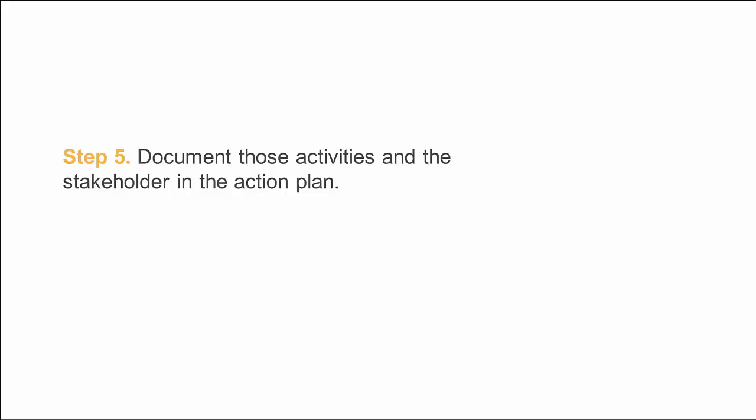And what you're going to find are a couple of things. One, if you're focusing on a knowledge aspect or a skill, there is almost 100% of the time an associated process. So you might have started with a lot of skill-type actions in your action plan. What you'll find is that once they're finished, they're going to create process-related actions that you need to take. In other words, the action plan will continually spin off new actions across the perspectives. So as you prioritize, you'll take your 2 to 4 weeks, complete it, then create your next version of that 2 to 4 week goal, and complete it.